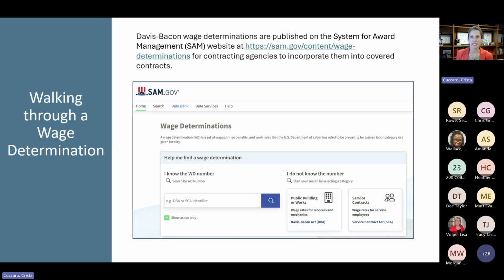That information already exists. But there could be an instance where there's something involved in your project for which a wage determination doesn't exist. And so in that case, you may need a project-specific wage determination. But generally, you're going to be going with that general wage decision. And there are 4 categories of wage decisions: residential, building, highway, and heavy, which is infrastructure related.